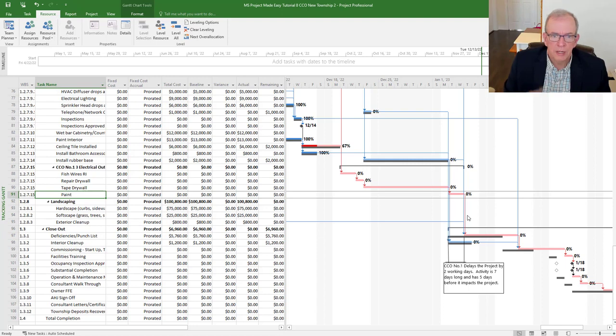They actually lose money. And here you've got 3 outlets we're adding to the project. And it's probably going to cost a couple of $1,000 for these 3 outlets because you've got an electrician coming in, they're fishing wires, you're doing rework with the drywall, the taping, the painting. And the client thinks it should be costing like $500 or $600. And meanwhile, it's costing $2,000. They think you're making a boatload of money, but you're not. So that's the other thing. You've got to be able to explain it and walk through it. And the more ways that you can put this together, the better it'll be for you.